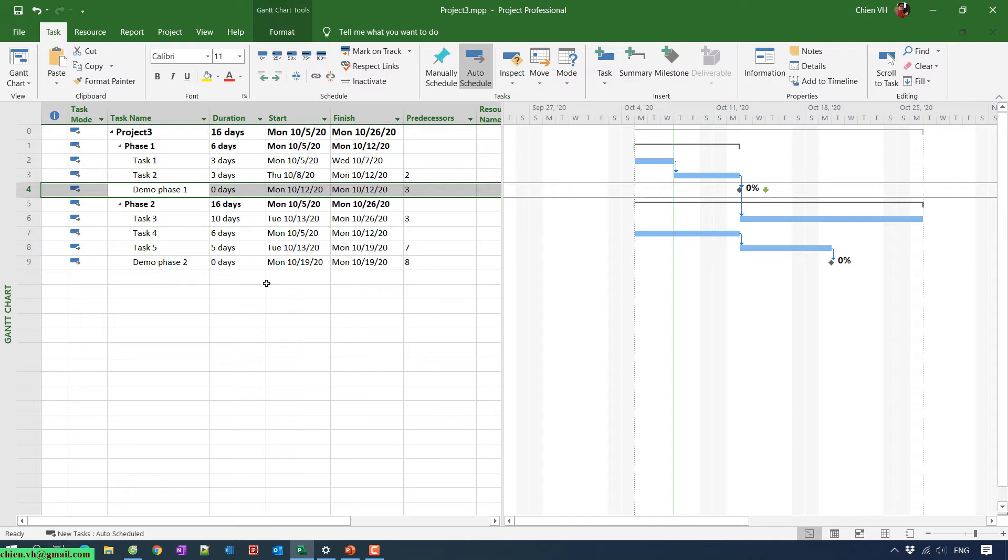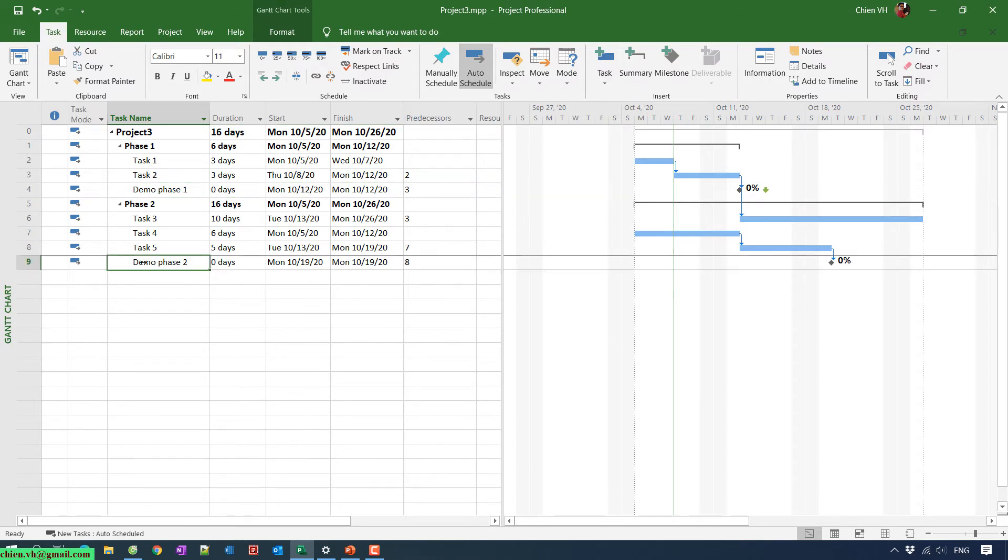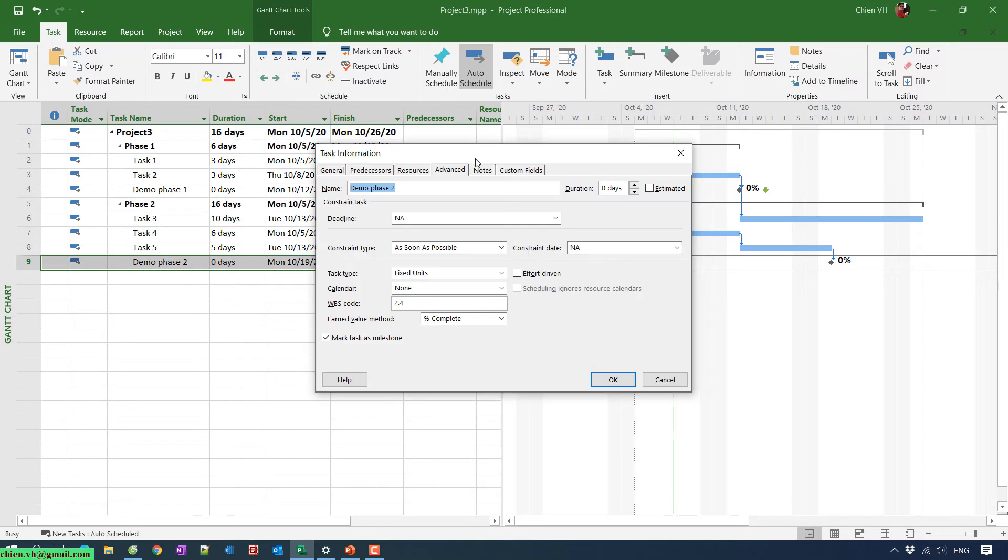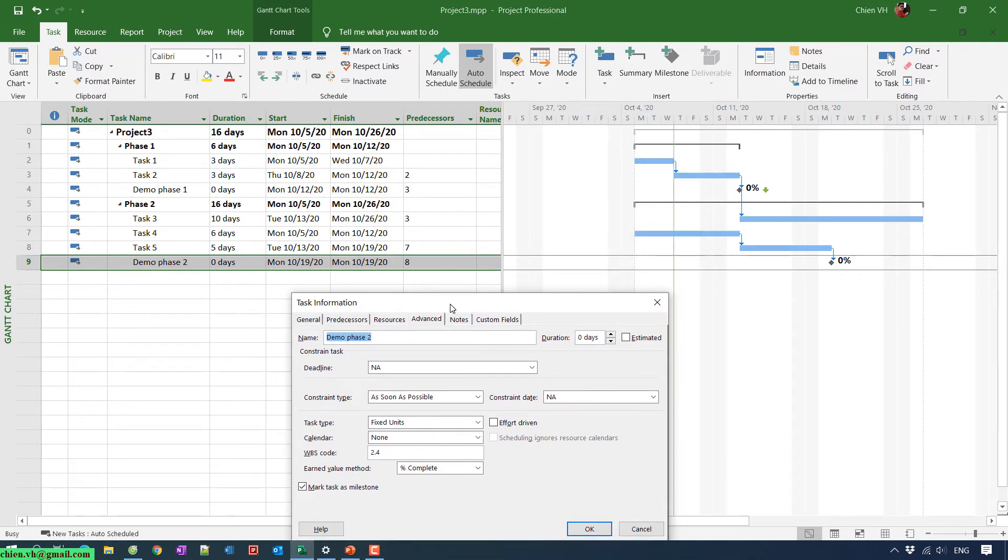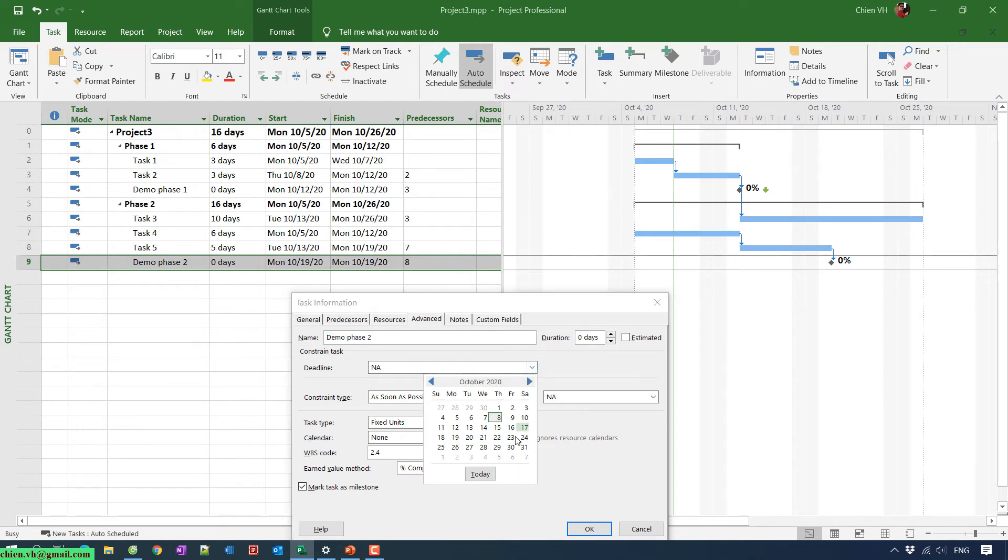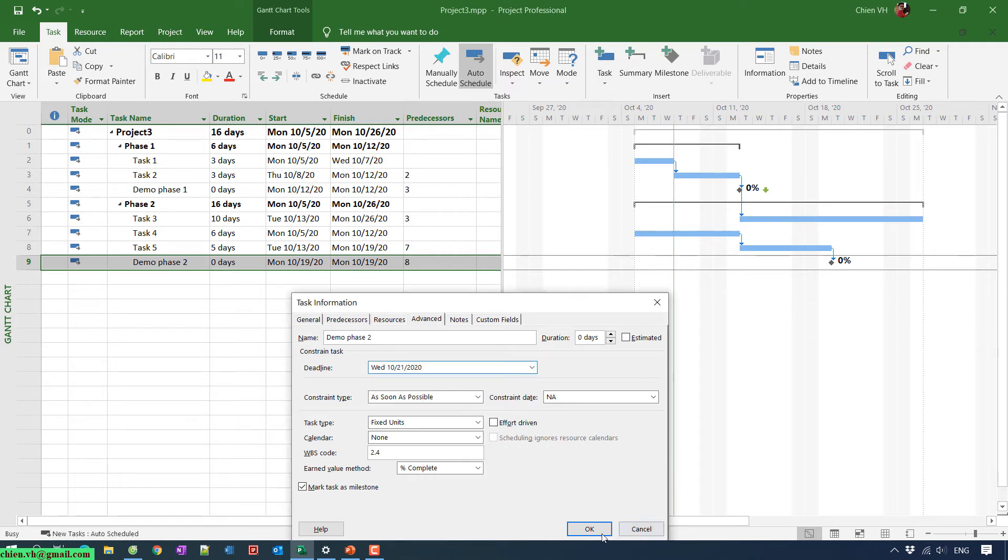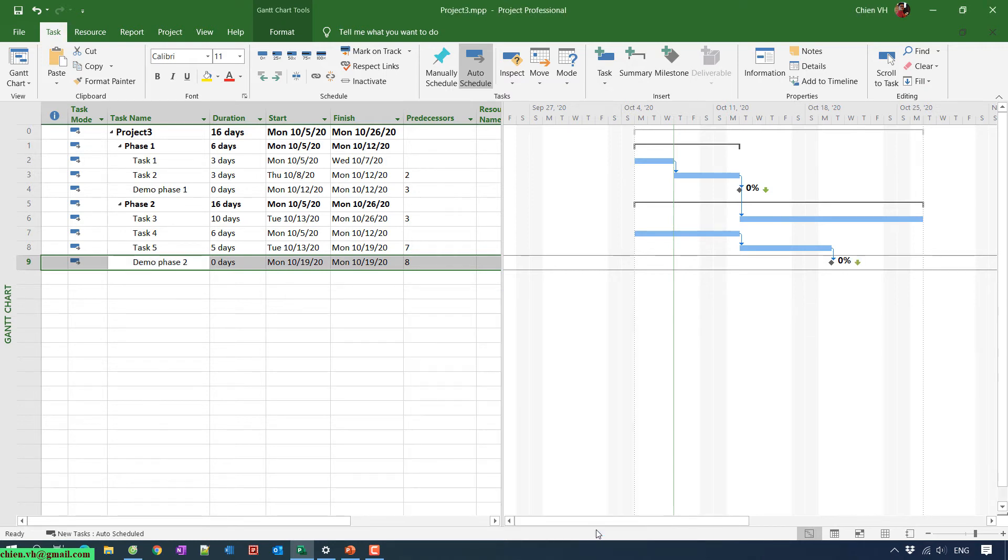And for Demo number two, I can go ahead and double-click on this one. Basically I will add two more working days after we finish this one. It should be on the next one.